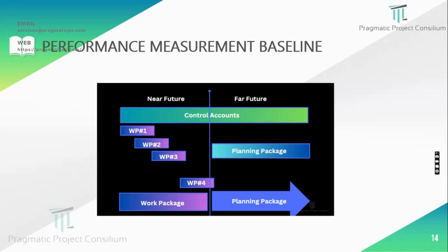Basically, the planning package groups logically related work, and that cannot be detailed further in the planning package, because we don't know the exact scenario. The planning package may be subject to change, and in fact the latest agile model also says to attack what is in front of you now, and then attack future activities later, and therefore we don't have any full detail.